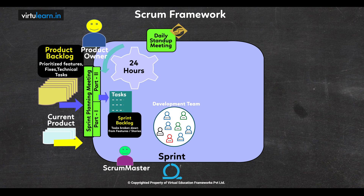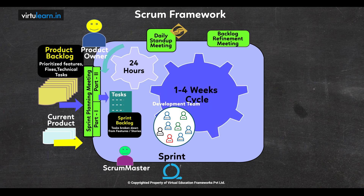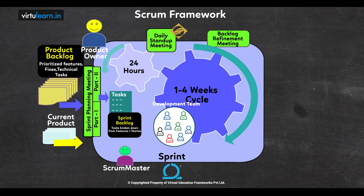During the sprint, the team spends an average of 10 to 20 percent of their time refining the product backlog so that it will be ready for the upcoming sprint planning. Sprint execution covers all the working days in the sprint — in a 2-week sprint, that is usually 10 business days, and the team sprints through all 10 days.